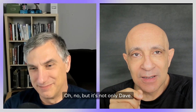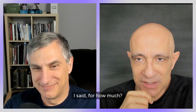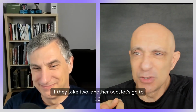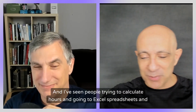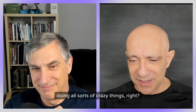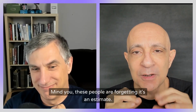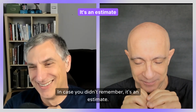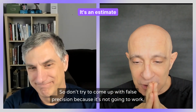Oh, no, but it's not only Dave. Little Joe is going out too. I said, for what? Well, another day too. Okay, so if Dave takes 2, another 2, let's go to 16. We're done. And I see people trying to calculate hours and going to Excel spreadsheets and doing all sorts of crazy things. Mind you, these people are forgetting it's an estimate. In case you didn't remember, it's an estimate. So don't try to come up with false precision because it's not going to work.